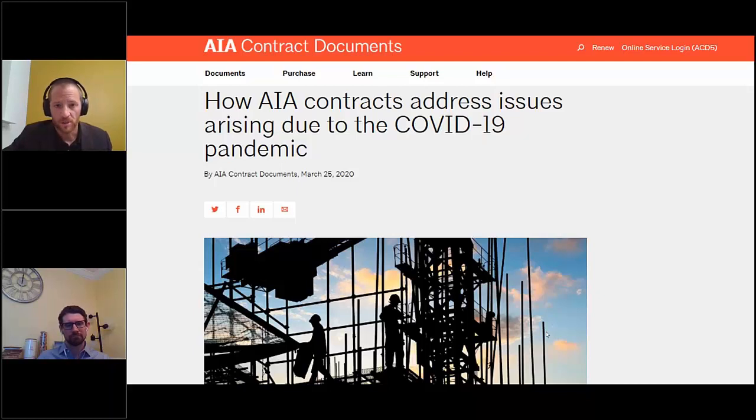And I will also caution, I was talking with a general contractor recently, and he mentioned that it's not as simple as just social distancing on a construction site. There are a lot of activities on a construction site that require multiple people to be in clustered areas. If you're doing a high-rise building, you've got to think about vertical transportation and how to get people up and down the building without passing each other constantly in the stairwells, those kinds of things. So this is a big effort for contractors.